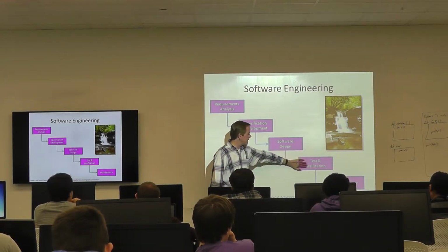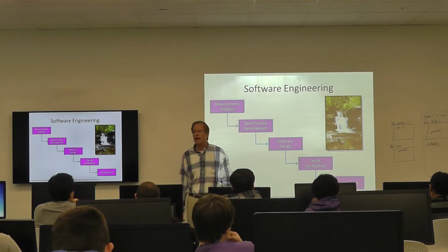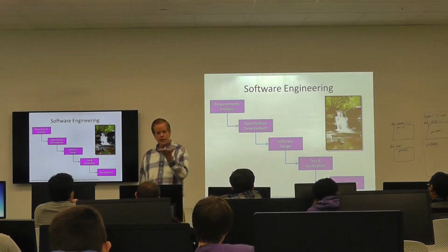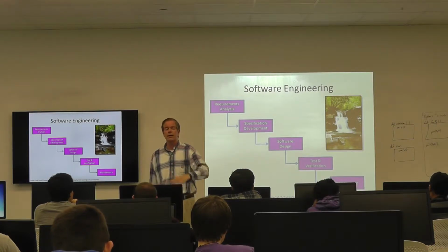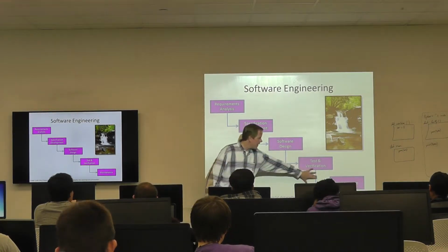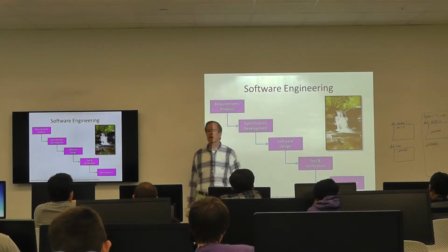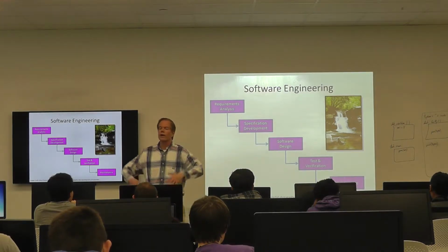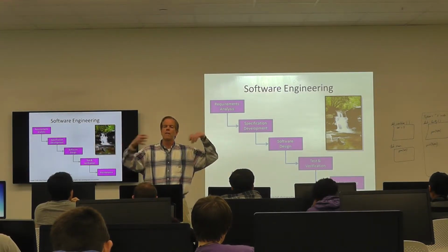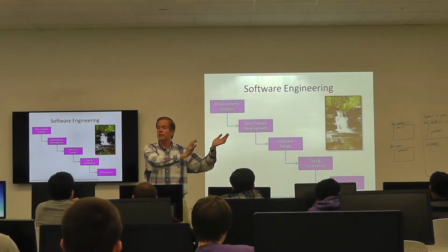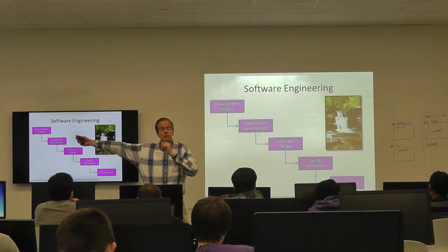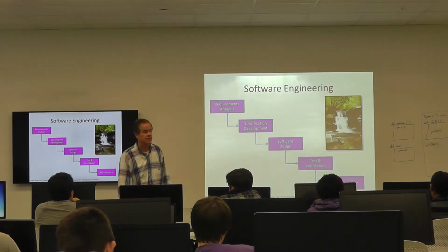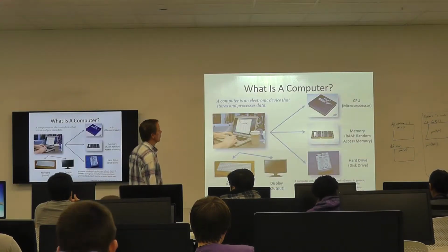But you're not done at that point. After that comes test and verification. Great, you've got some great looking software. Does it do what it's supposed to do? You have absolutely no idea until you get done testing it. Then, as we talked about, comes the concept of maintenance. And in the world of software development, about 20% of your time is going to be spent creating brand new software, and probably about 80% of your life is going to be spent supporting or changing existing software.